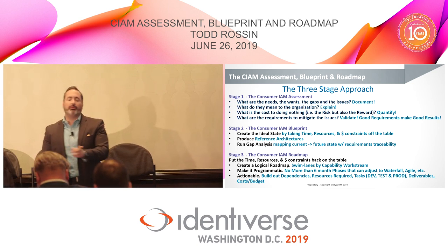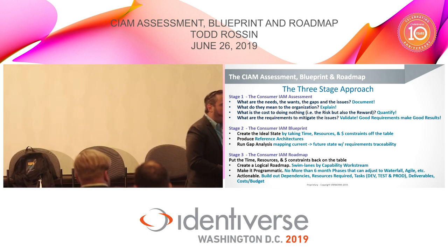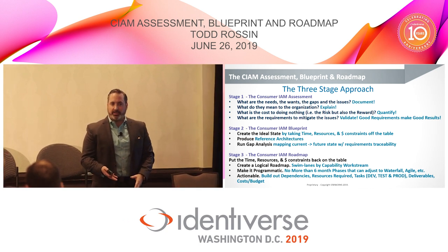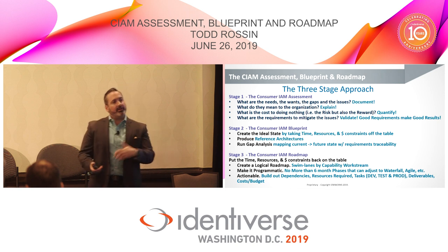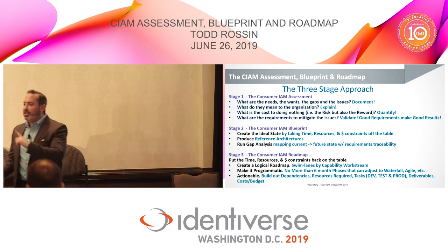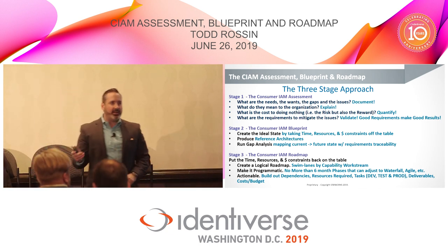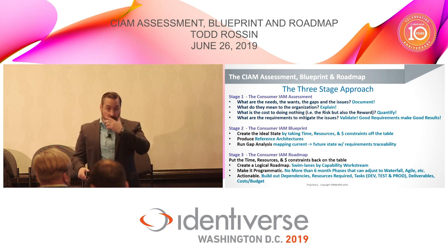Dev to test, the deliverables. Oh, resources required. I knew I was skipping one. Do I need a 50% PM on this one, a half-time architect / tech lead? Do I need an engineer full-time? Yeah, if we know it's a month long or whatever, we can figure out numbers based off of that because we know now what goes into it. Oh, and define the deliverables, by the way. I skipped this one in the last one. I could kick myself for it.